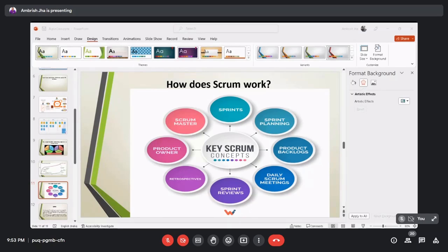For other things we keep some time, and then we make it 5 hours every day. Every person will work 5 hours in a day. It means the team has 35 hours in a day. Then usually in a 2-week sprint, there will be 10 working days, so it becomes 350 hours of availability of the engineers' time.